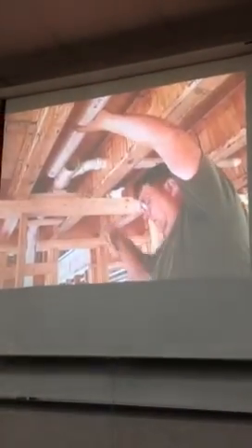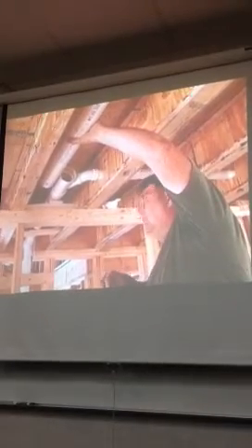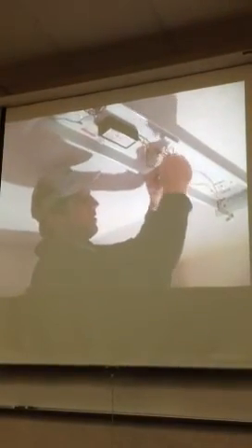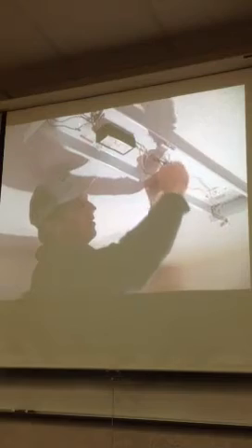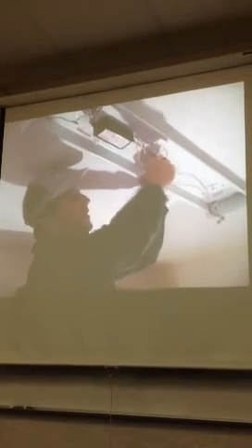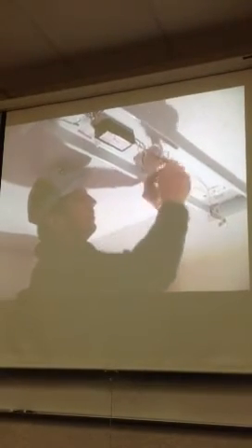But why are they put in before the house is finished? Because the walls and ceilings need to be open so that there is space to install air ducts for the heating and cooling, the wires for the electrical systems, and the pipes for the water and sewer systems. Then later, when the walls, ceilings, and floors are covered, the right fixtures, switches, and appliances can be installed. Great. Now, when do you start painting and carpeting and...